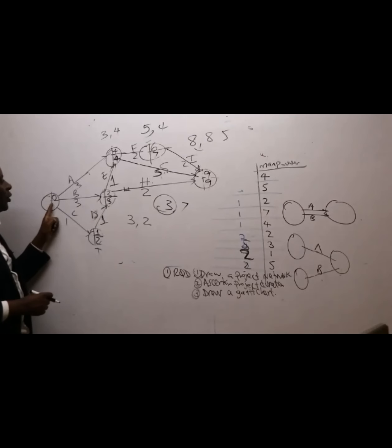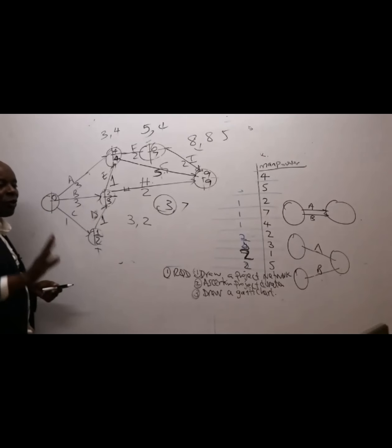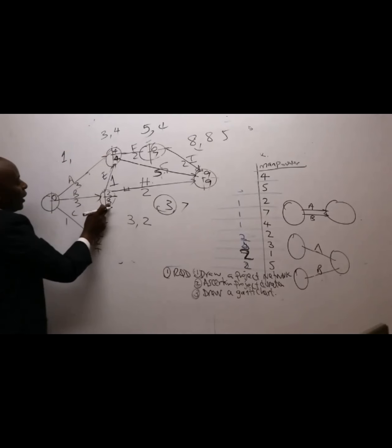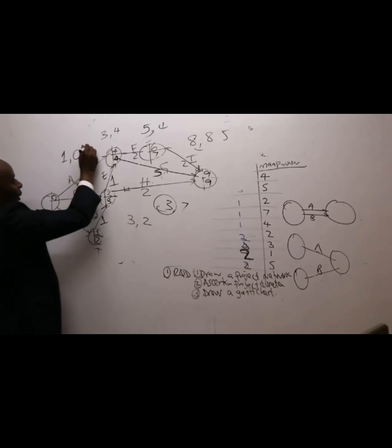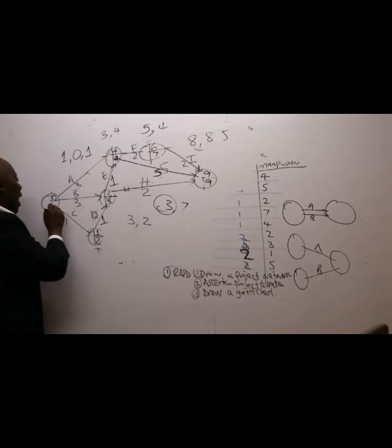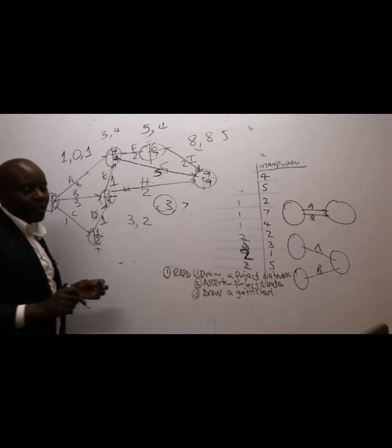Come back to this. These are tricky ones. Ladies and gentlemen, we have got how many arrows moving us back? 3 of them. So 4 minus 3 gives me 1. We have here 3 minus 3 giving me 0. We have 2 minus 1 giving me what somebody there? Giving me 1. So between the 3, of course, it is about the lower. So come and put 0 there.